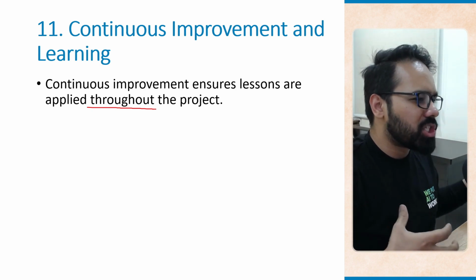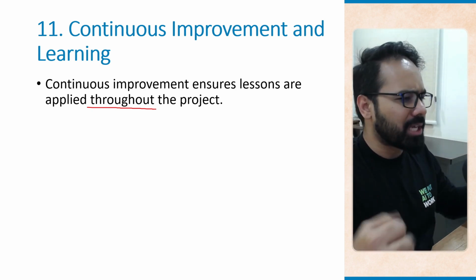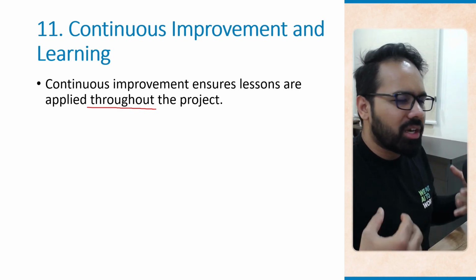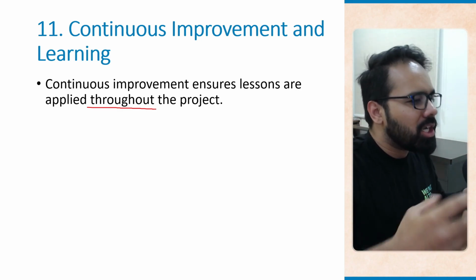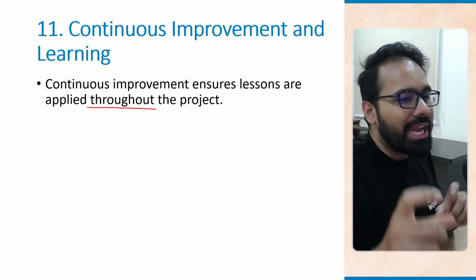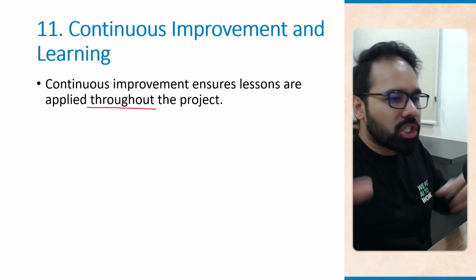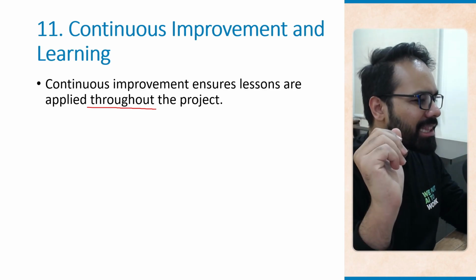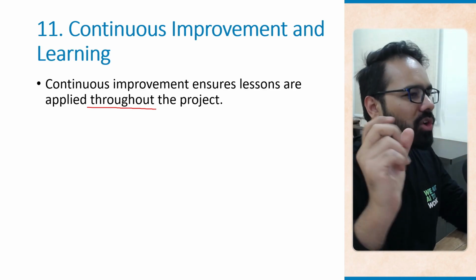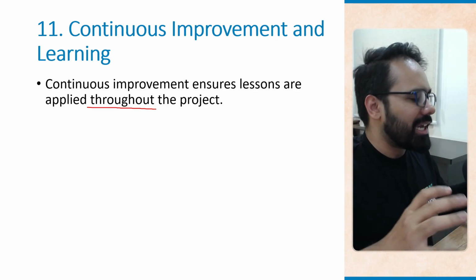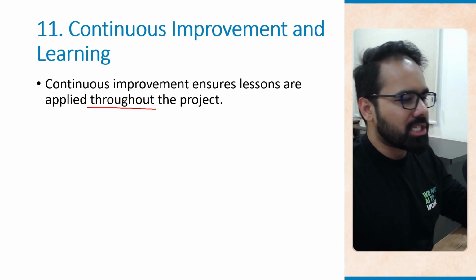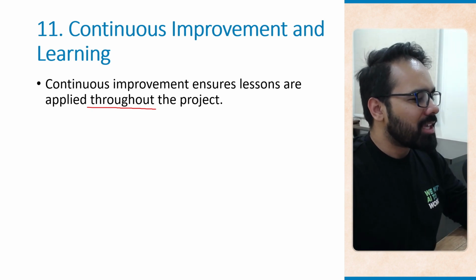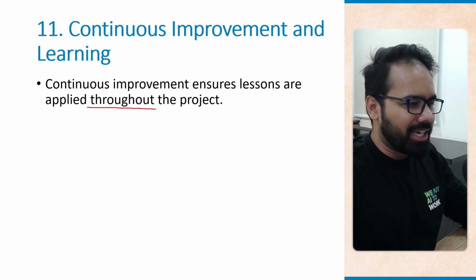In our e-commerce development project, the e-commerce website development, that is, this might mean holding retrospectives after each release or after each sprint to capture what went well and what needs adjustment. So this is something that you're doing every 2 weeks or after every release, which could be, let's say, a monthly release, which involves 2 sprints. So if you do retrospectives like that, instead of waiting for 6 months once the whole new feature or a new website goes live, that is something which is not expected here.